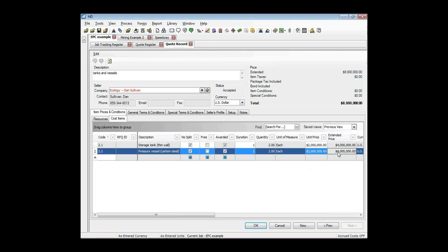All right, the beauty of this commitments capability is that I can leave my control budget the way it was, because that perhaps is how I'm going to be measured in terms of success for this project. But now I want to hold Ecology, and I want to measure Ecology's actuals to the number we're committing to them, which is this $4 million total for each of those lines.